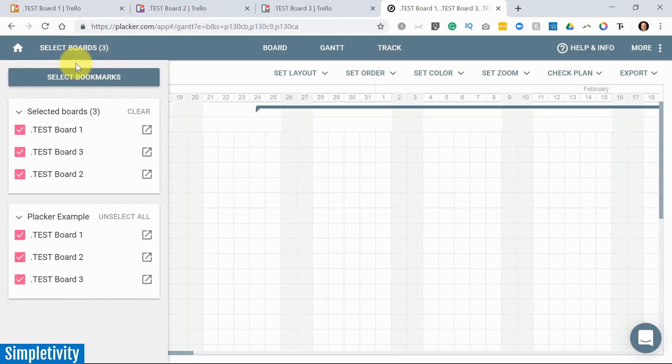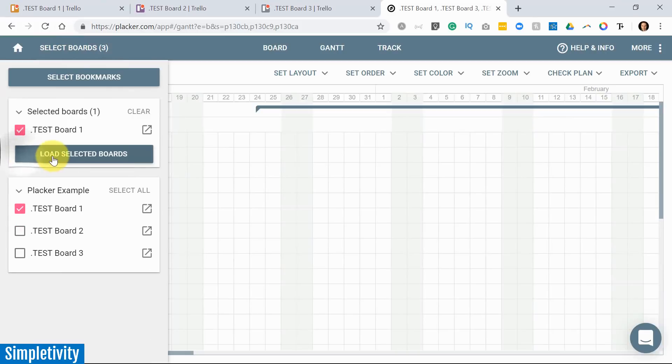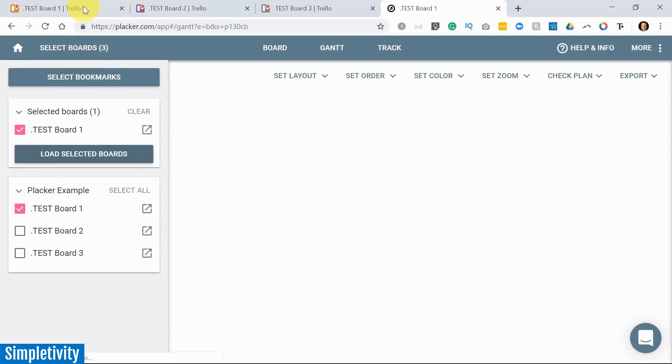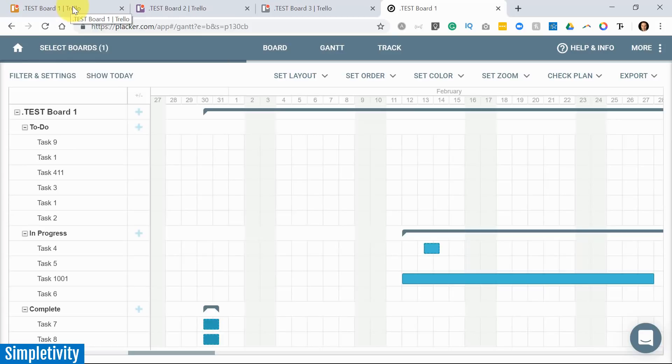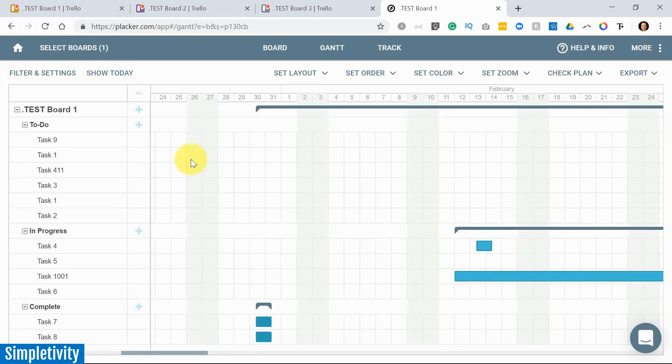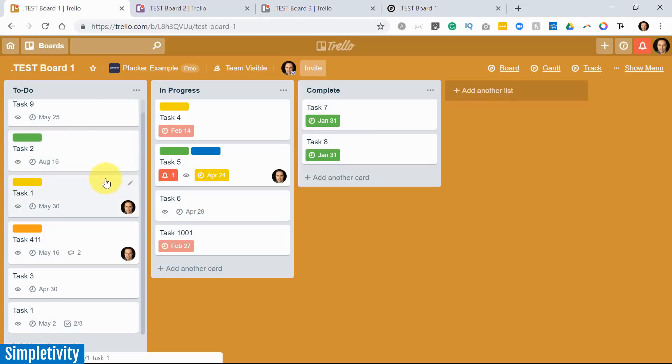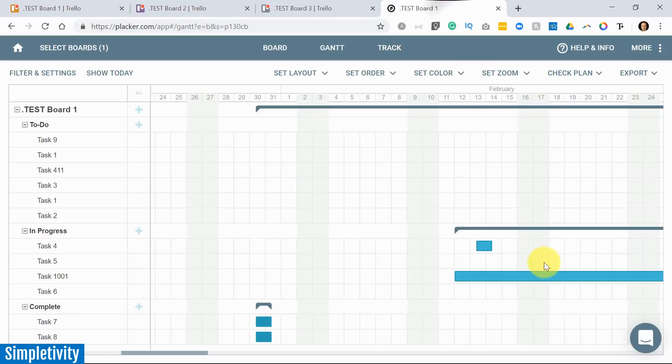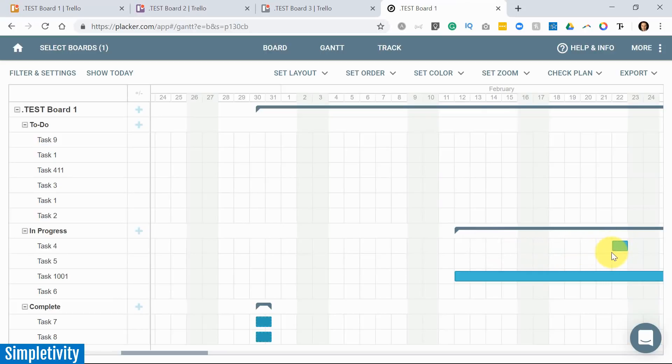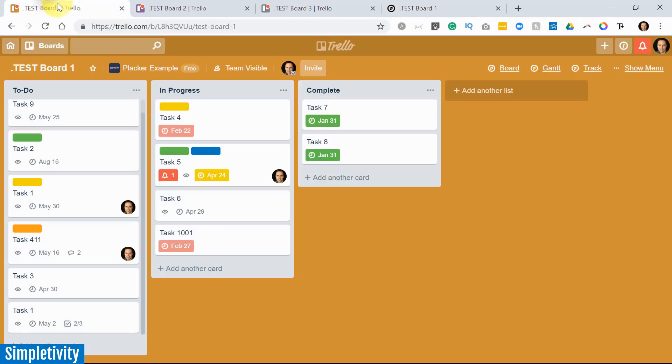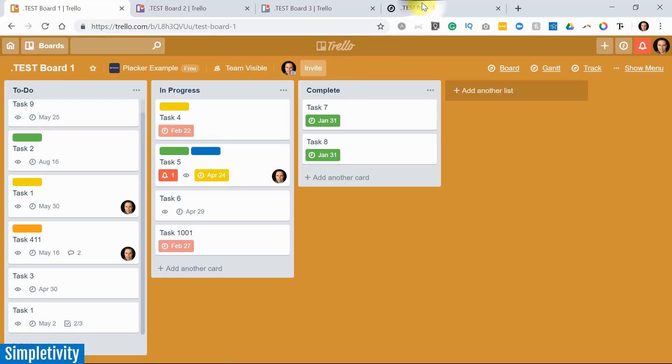Now, just for simplicity's sake, I'm actually going to remove two of these boards just so I can go back and make sure that I'm interacting with the right tasks over here. So I'm going to remove those other two boards. We've just got test board one here working. And let's look at task four, right? So here it's about to start, it's about to be finished here at around February 14th. Well, let's say there's a delay or something like that. So task four, let's go back and make sure that it's synced up here. Task four, February 14th, there you see it there. But let's say I prefer this view. And I say, I really need to push that out. There's other things going on. I'm just going to drag this out about a week from now. It's going to be due right over here along the 22nd. If I go back, task four, look at that. It's changed it automatically. February 22nd, an instant sync between the Gantt chart and my view here.